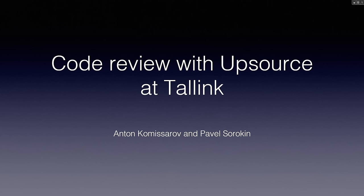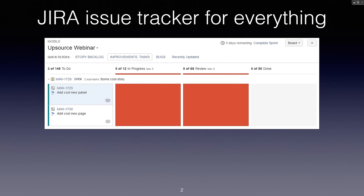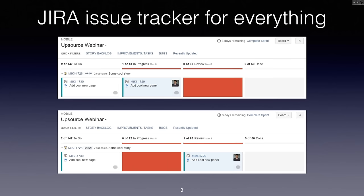I'm going to show you the flow of development that we used before we discovered Upsource. We use Jira as our issue tracker, and all of our development is split into stories, which are in turn split into tickets. Here we can see our Kanban board — we move tickets from left to right, from to-do to finally done. The ticket moves through the Kanban board columns, and the review column is when the work done by a developer has to be reviewed.